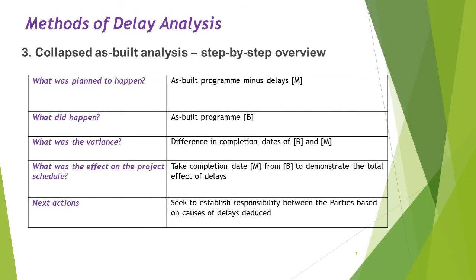Now, Collapsed As-Built analysis. What was planned to happen? That is the as-built program minus delays, M. What did happen? What actually happened was the as-built program, B. What was the variance? The difference in completion dates of B and M. What was the effect on the project schedule? We take the completion date M from as-built program B to demonstrate the total effect of delays. Next action: seek to establish responsibility between the parties based on the delays actually deduced.